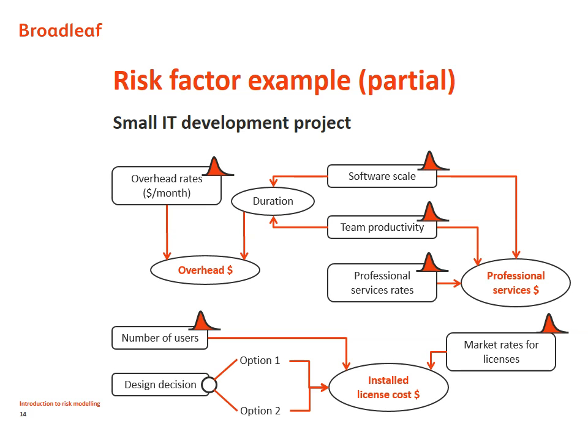That design decision, as it is shown here, would be an event in reality, and so it would be modelled as an event in the model. It's either one thing or the other, not somewhere in a range. The uncertainty about rates, scale, and duration is all variation within a range, not events, and it's important to keep the two distinct.